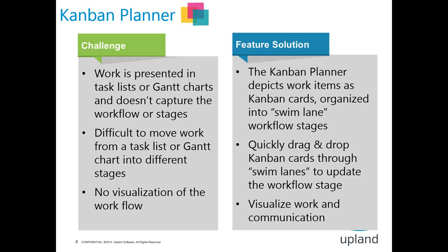Kanban solves this by depicting work items as cards, which are then organized into swim lanes that depict the various workflow stages. End users are able to drag and drop those cards through the swim lanes to reflect and visualize the appropriate workflow stage that the work is in. Let's have a look at this.